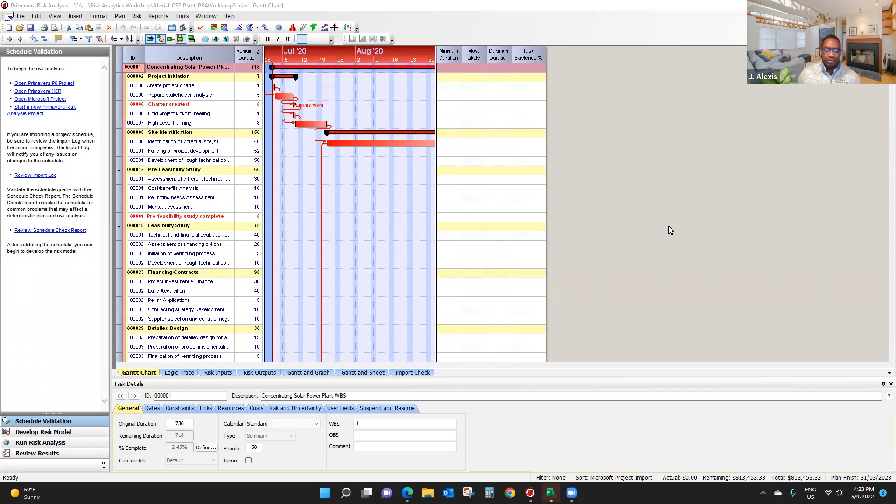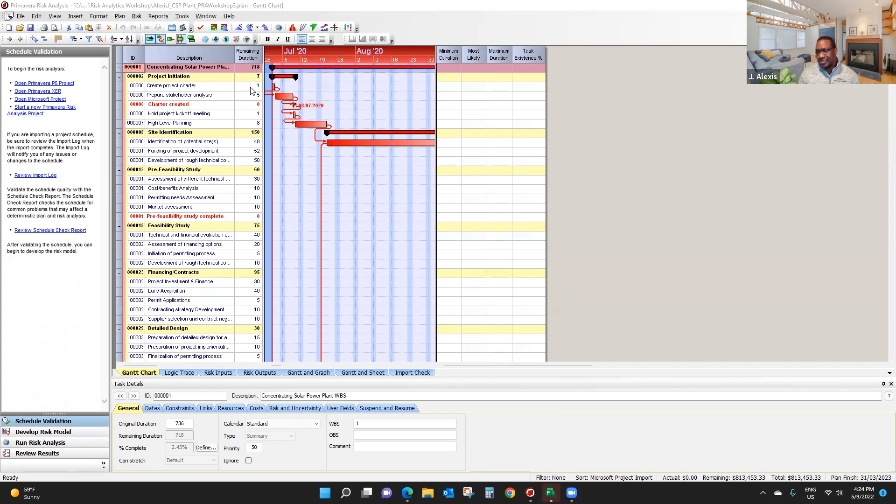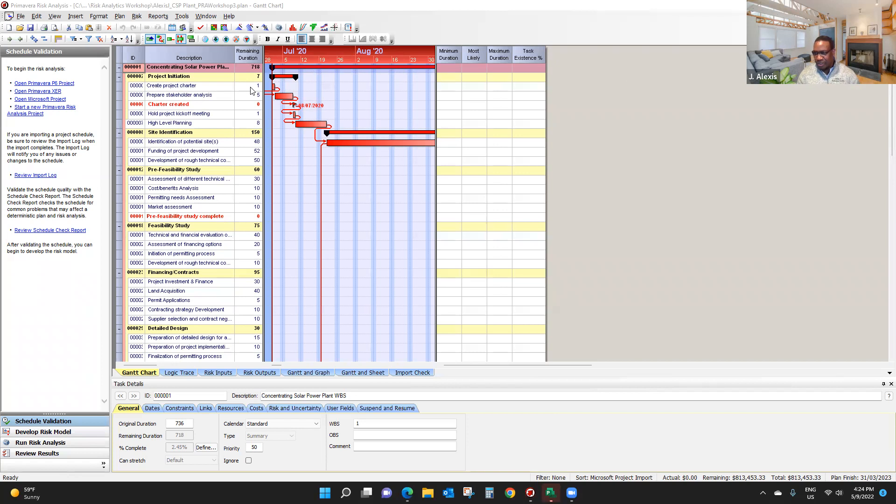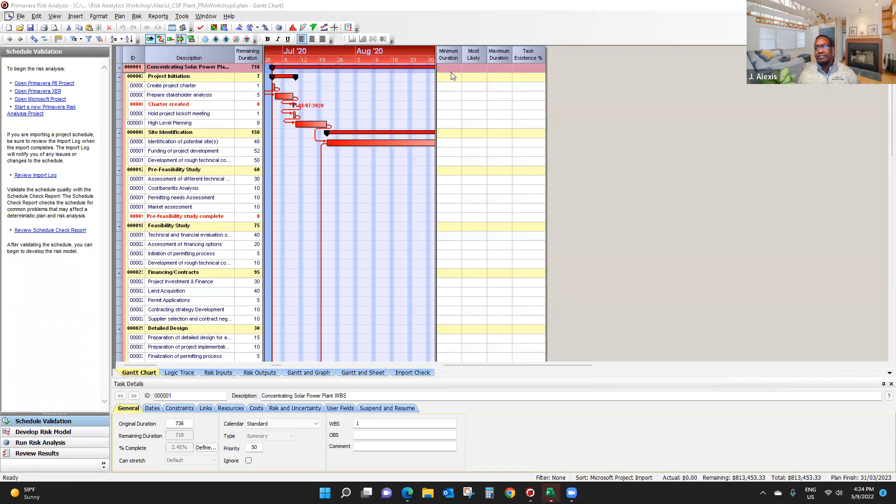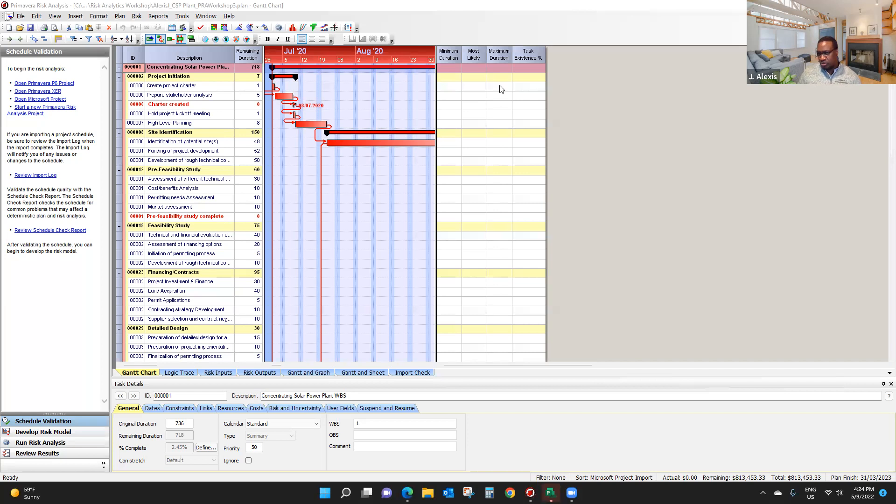So if you take a look at my screen here, you can see you have remaining duration. Remaining duration is the information we imported from Microsoft Project in the first video. So what we're going to do, we're going to take a look at how do we have three-point estimates. Minimum duration, most likely duration, and maximum duration.